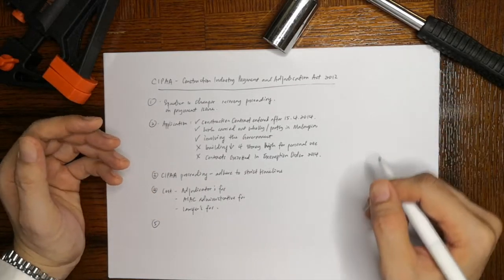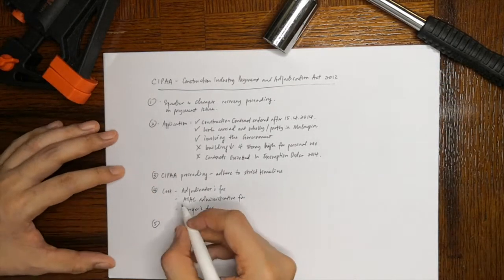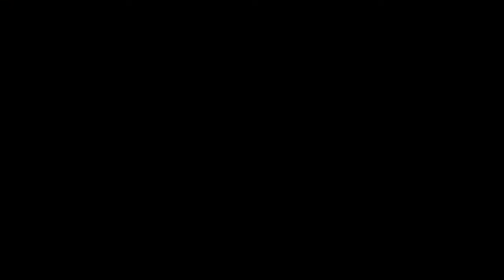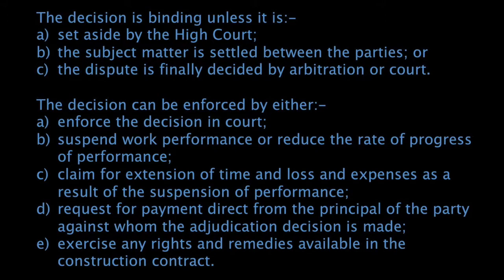An adjudication decision is binding unless it is set aside by the High Court, the subject matter is settled between the parties, or the dispute is finally decided by arbitration or court.